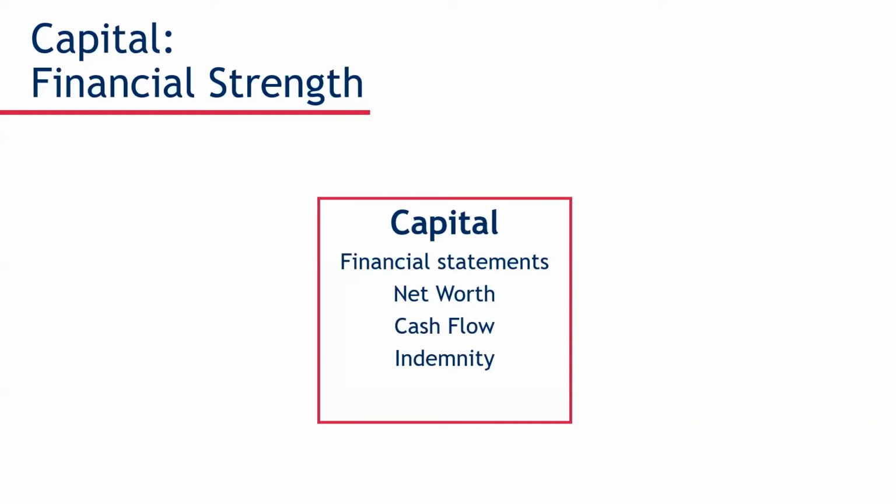And in that financial statement, the surety companies are looking at the composition of the net worth, the retained earnings. Are we retaining profit? Are we just distributing everything out and creating a tax loss? What does the cash flow look like? Is it positive from operations? Is it negative from operations? If it's negative, and I know COVID has certainly impacted a lot of my contractors' financial statements, but with a lot of the PPP money coming through, the cash flow has actually been flipped around, and it's been very positive for quite a few of them.